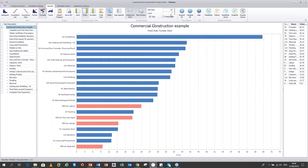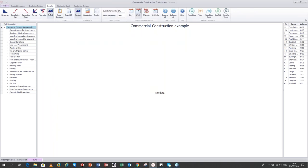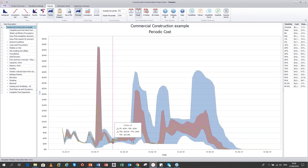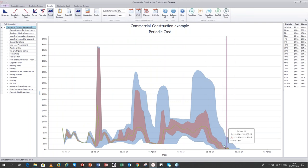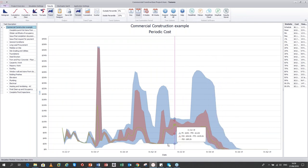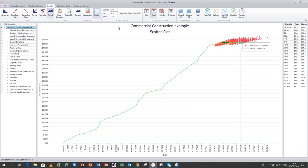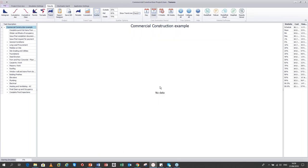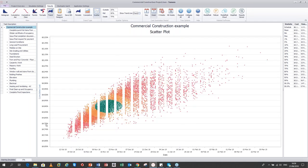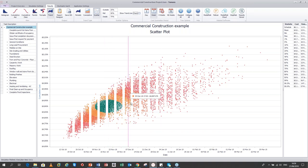You can include risk factors such as labor, poor site management, design, and steel skill in the tornado to see their combined impact. The trend plot shows cash flow over time — periodic or cumulative. The scatter plot shows finish date versus total cost across all simulation samples, with a trend line, letting you assess the probability of finishing within a target cost and time combination.